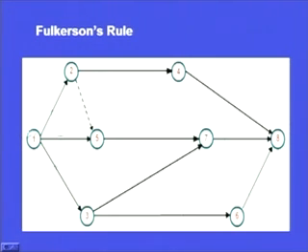So, this becomes our node number 1, because only the arrows are coming out, there is no arrow going in. Now, we will strike off all the arrows coming out of node number 1. This will strike off, this will strike off and this will strike off.